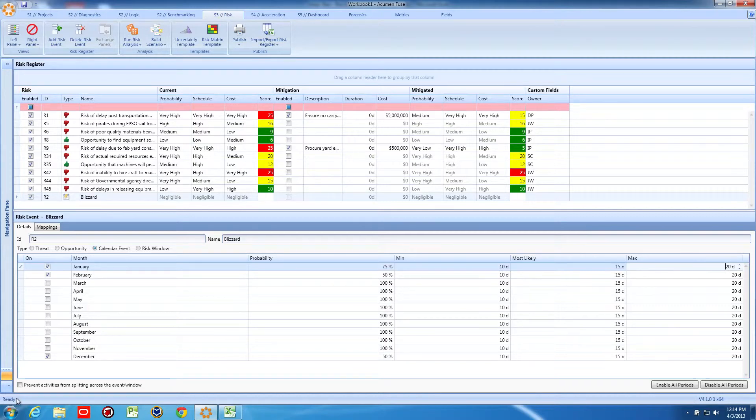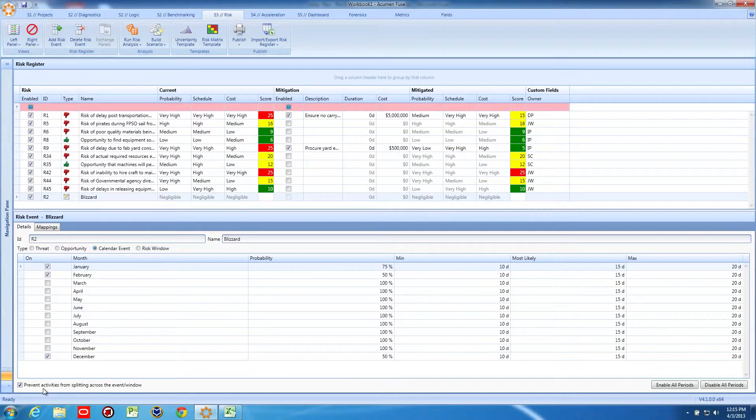Next, we can indicate whether activities can be split across a blizzard, or if the entire activity must finish prior to a blizzard, or perhaps push to start after the calendar event.